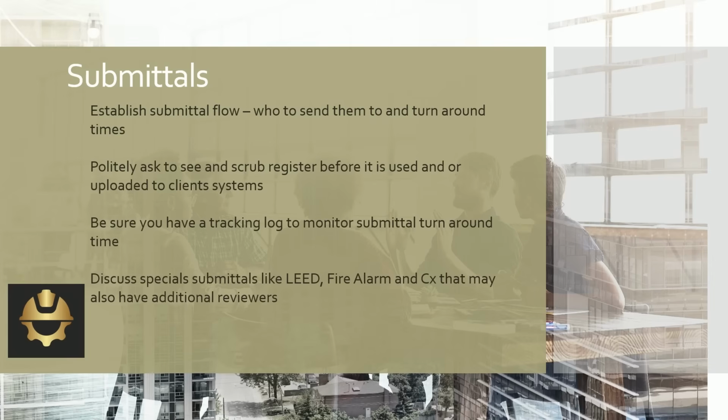For sure. The next step is to politely ask, and I say politely because this is going to be a rub, no matter if it's a firm you've worked for or with for years and years, but you need to ask to scrub that register before it's uploaded into client systems, especially on Federal Corps of Engineer projects.